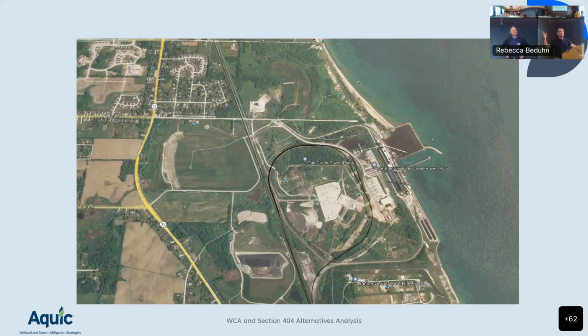Again, uncomfortable pause. I said, well, maybe you need something to burn at your plant. "Well, yeah, we need coal." I said, okay, so you need to be able to get coal into this facility. "Well, yeah." I'm like, okay. See where I'm going with this? I said, what else might you need? Uncomfortable pause. I said, do you need cooling water for your thing? "Well, yeah, we gotta have cooling water. I mean, that's why we're right there right now." I'm like, okay, so maybe that sort of defines sites that are gonna work for you and not work for you. And then maybe you need access to the power grid in order to deliver the actual electricity to your customers.